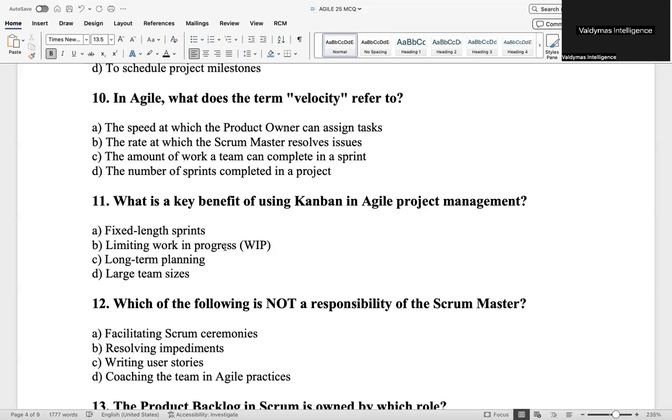You agree before you start that maybe the maximum story points taken will be 30. Once you pick 3 or 4 stories that equal 30, you have to complete that work in progress. Maybe someone picked 3 stories and someone picked 1. If the people who picked 3 are done, but the one who picked the 4th is not done yet, we join hands with him and complete his story before we pick another set of 4 stories. Do you understand?